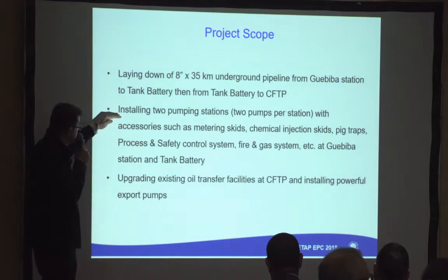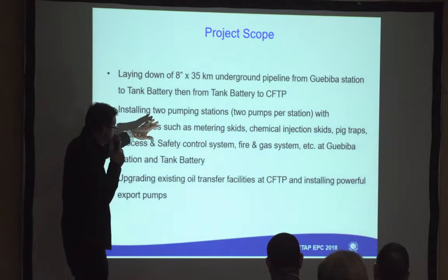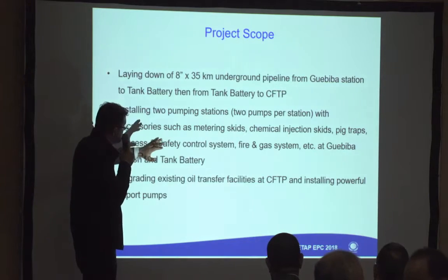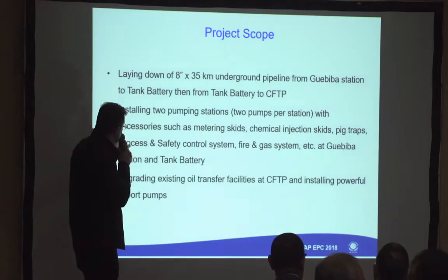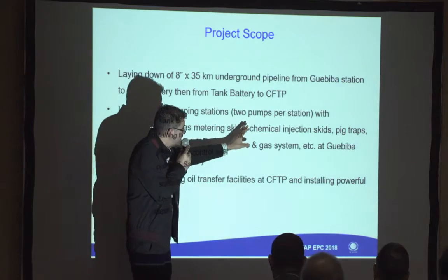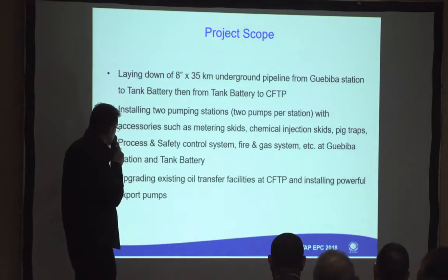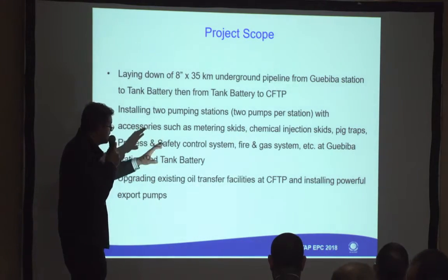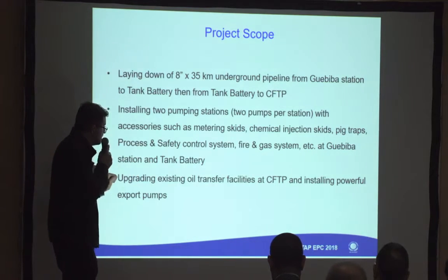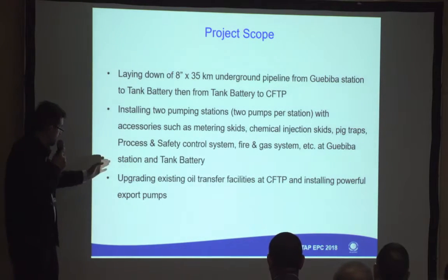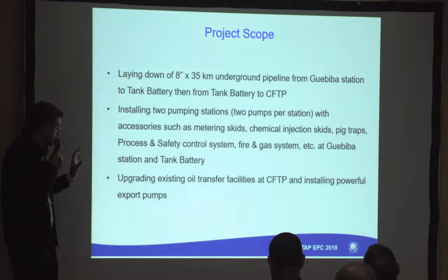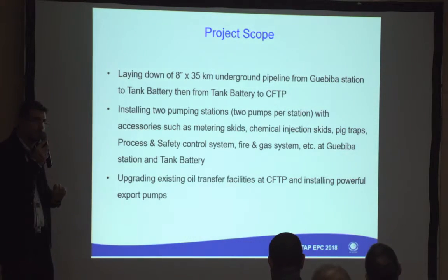Also, within this project, we installed 2 pumping stations, fully instrumented with all accessories like metering skids, chemical injection skids, pig traps, process safety control, and fire and gas detection system. All this was installed within this project. And we also upgraded our oil transfer facilities at CFTP, and installed more powerful export pumps to export the oil from CFTP to La Trapsa.